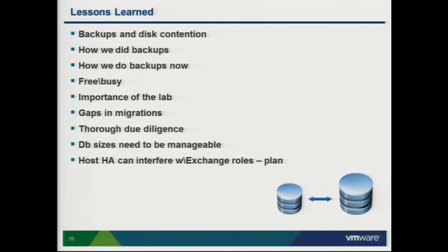And you're looking at either dealing with that impact, you have to have some kind of coping strategy in place or a workaround or a kludge or a Band-Aid to get those people the functionality that they don't have anymore, or you've got to roll them back. So migrate some people and let it sit for a week or 2 weeks and make sure everything is smooth, none of those gremlins pop up. And again, all 3 of these bullets go hand in hand. Thorough due diligence, same thing.